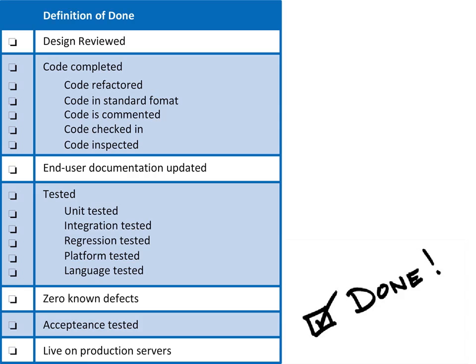Now, before we go into talking about the sprint review and sprint retro, let's spend a little time on the definition of done. This is something that you define together with the product owner early in the game, and this is like a checklist of things that should be achieved per story before it can be considered as done. Because remember, in Agile, there's no value in a semi-finished output. It's either done or not. So it's a 0 or 1.